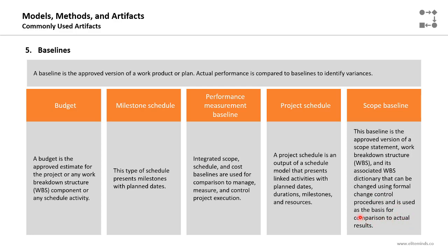So similar to the cost baseline and the schedule baseline, the scope baseline is the approved version of three things: the scope statement, the work breakdown structure, and the work breakdown structure dictionary. This will be our reference throughout the project execution to determine if we have any items that are out of